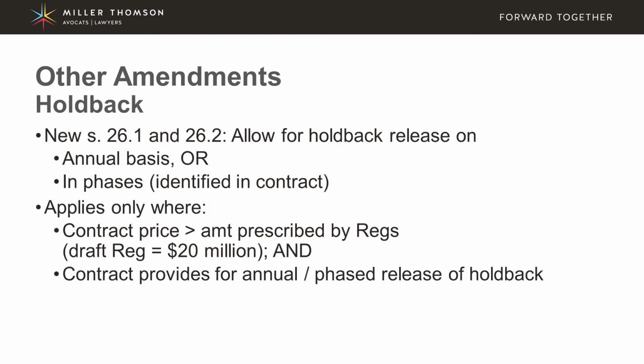Another significant amendment will be with respect to holdback. As I'm sure you all know, when a payment is made to a contractor on a project, the owner is required to pay 90% of the invoice and hold back 10% as statutory holdback under the Lien Act. And that has to be maintained until the end of the project and until the expiry of the lien period.